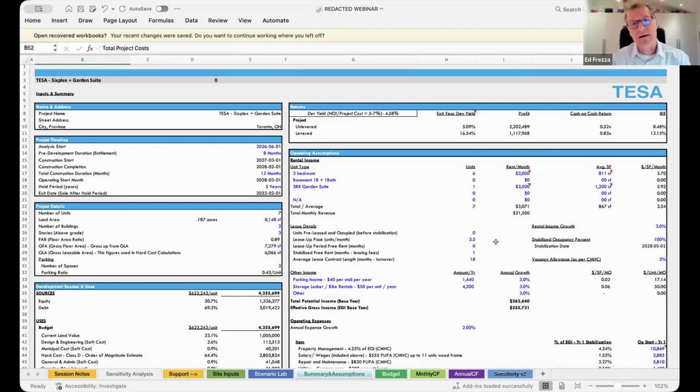With that, we can then define what the massing looks like, which is to say, what is the biggest or most suitable cube that we can build on this lot, being respectful and mindful of height restrictions, of setbacks, both side, front, and rear setbacks, et cetera. With that hypothetical box, we can then figure out how many square feet, and that becomes relevant because, knowing how many square feet we have to build, we can cost out the hard and soft costs.